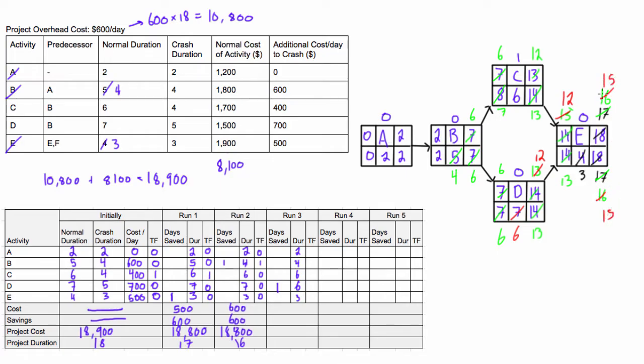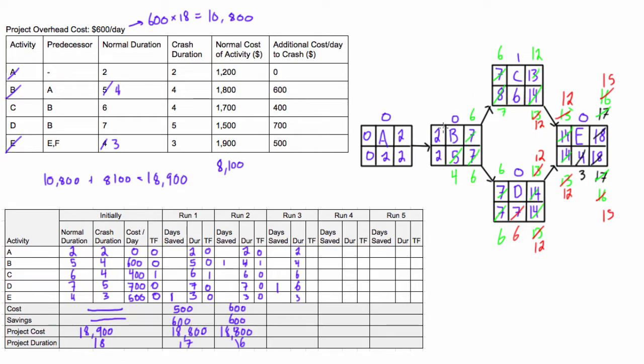So there you see it. We've reduced the project duration by one day. So then we'll have 15 minus 3. The late start now becomes 12. And we're gonna bring that 12 into each of these positions. Again, sorry, this gets really confusing. It's easier actually if you draw like a whole PDM network diagram for iteration one and then redraw the whole thing for two, but I just don't have space for that. So we're gonna go ahead and keep going like this.